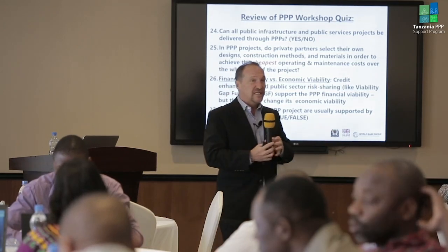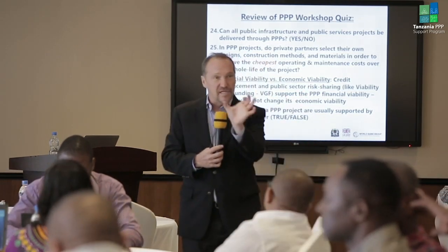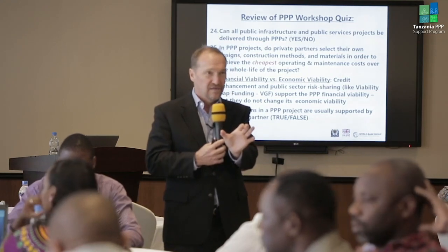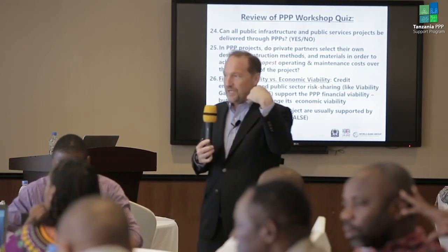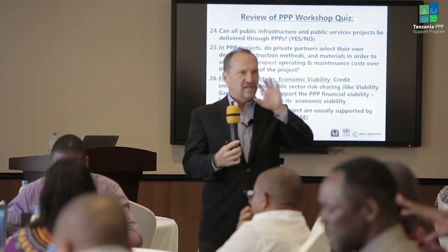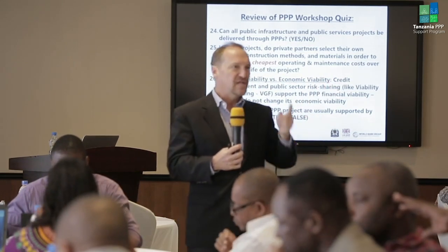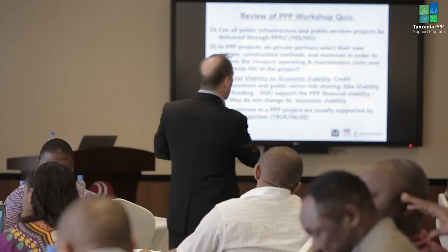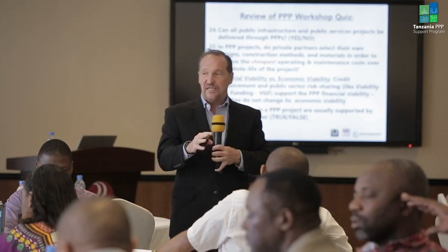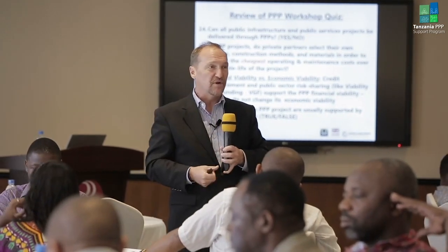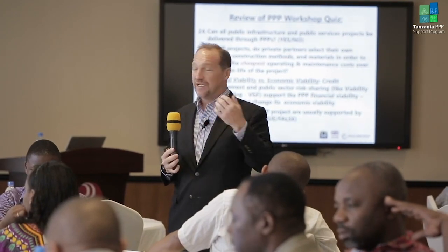Second one here is that they have a question on economic analysis versus financial analysis. Sometimes I see people put those two together. They'll say, in the economic and financial analysis, it shows this. There's a difference between economic and financial viability. And they say here that credit enhancements and public sector risk sharing, like the public sector contributing funding, will support financial viability, but it doesn't change the economic viability of the project. And in this case, that is true.